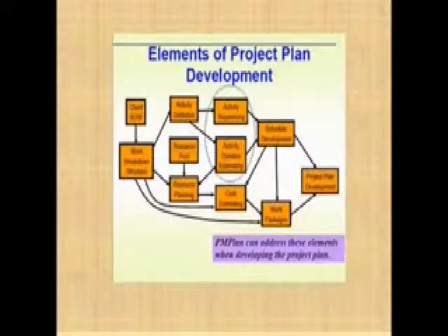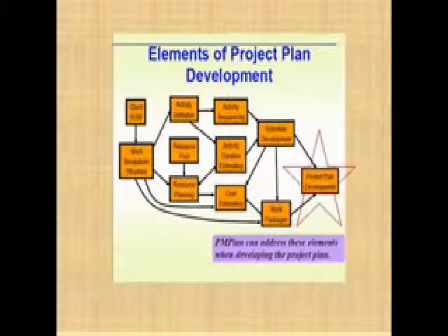And this will lead to the estimated activity durations so that a schedule will follow. Alongside with it will be the cost that will be estimated for each activity so that it can come up with a budget, and that will comprise the project plan.